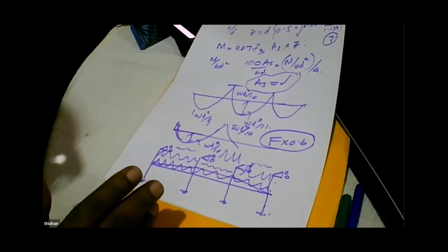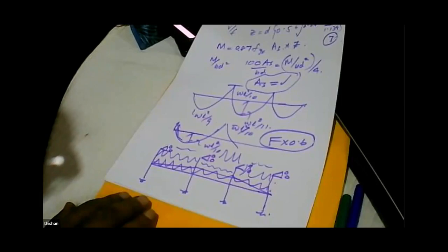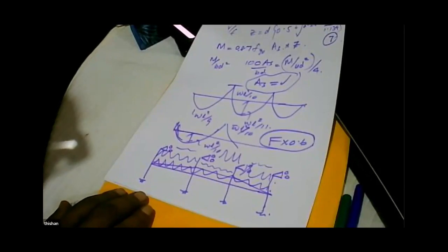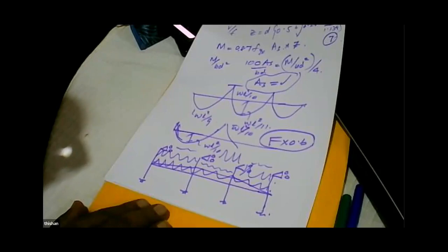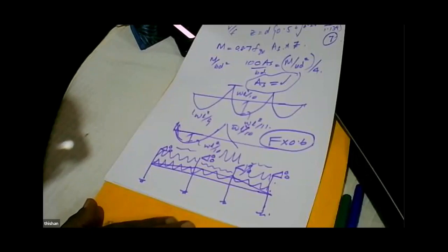Because, let's say you are in a 5,000 million big project, a 30-story or 40-story building. It will cost 5,000 million, and you are going to reduce the structures cost by 40%. In a 5,000 million project, 2,000 million will be the structure. Out of 2,000 million, you save 40%. So you save 400 million, whereas the design fee is 50 million.